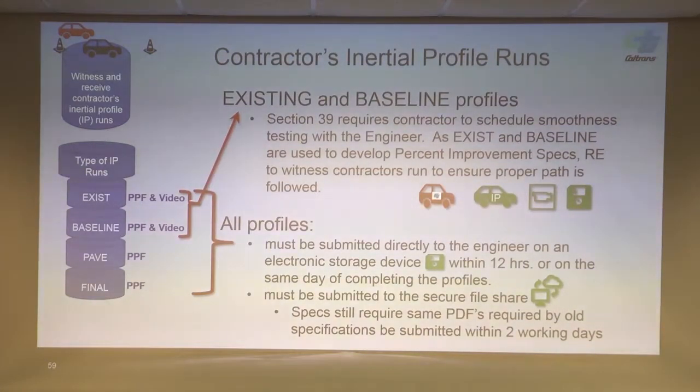And also we're doing that for the baseline. So why do we care about these videos on these two profiles but not these other ones? Well, we can go run these other ones again later. They're always going to be there. These are going to get covered up with pavement or ground away.